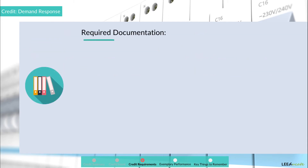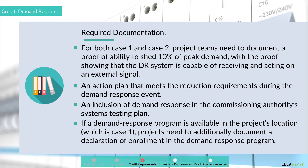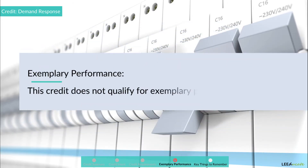Activity 4: contact the local utility to discuss participation in future demand response programs. For both Case 1 and Case 2, project teams need to document a proof of ability to shed 10% of peak demand, showing the DR system is capable of receiving and acting on an external signal. Teams also need to document an action plan that meets the reduction requirements during the DR event, and inclusion of demand response in the commissioning authority's systems testing plan. For Case 1, projects must additionally document a declaration of enrollment in the demand response program. Note that this credit does not qualify for exemplary performance.